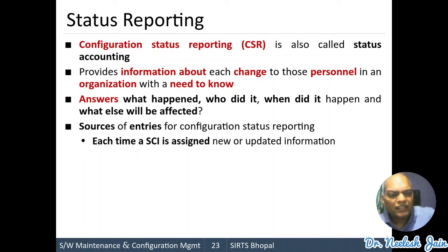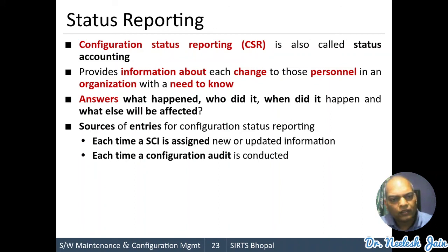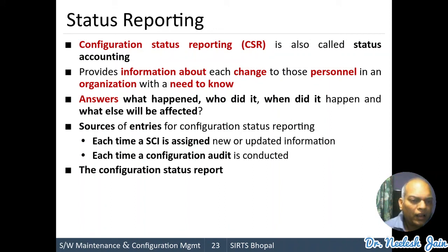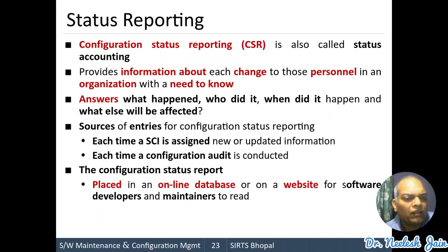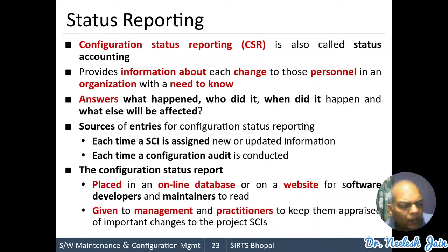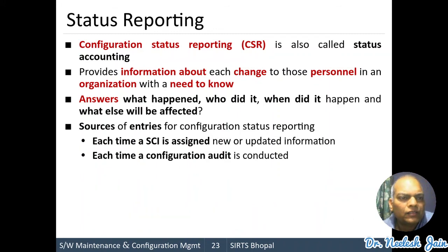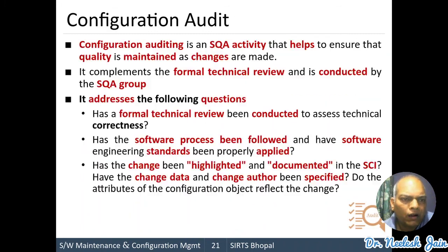It is a source of entries for configuration status reporting. Each time an SCI is assigned new or updated information, each time a configuration audit is conducted, a configuration status report is prepared, which is placed in an online database or on a website for the software developer to maintain and to read. It is given to the management and the practitioner to keep them apprised of important changes to the project SCI. In this way, we have studied all the 5 layers of the SCM process.